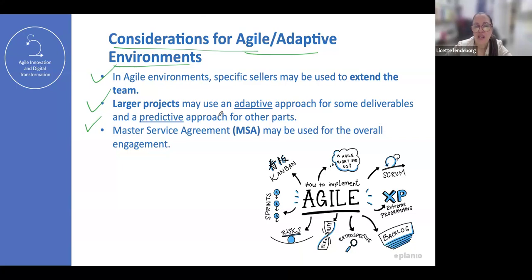So having said that, in agility we can have both approaches for procurement. An example that I have in my mind is when you are going to install an IoT, Internet of Things, system. If you are installing security cameras in your house, you have 2 parts in that project. Pay attention. You need to buy the devices, cables, and adapters, and for those physical deliverables you can use traditional project management.